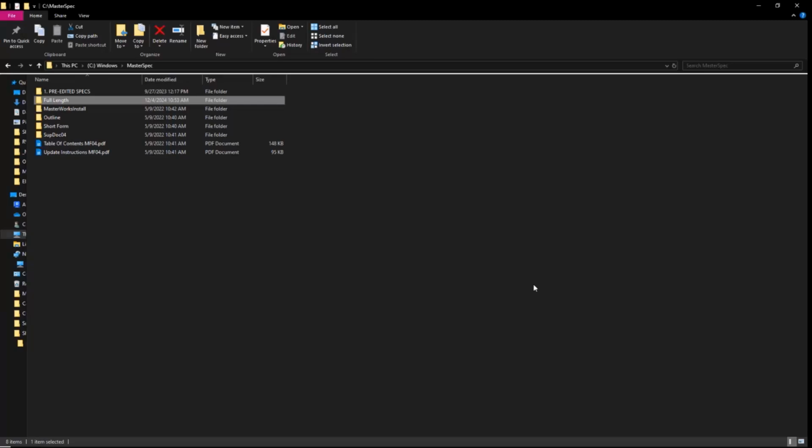If these were larger projects with larger budgets and longer construction times, I would have kicked them back and said, no, each one of these needs to be a submittal. But it's a $50,000 job, start to finish. I'm not worried about small potatoes like that. But when it's an $80 million wastewater treatment plant, for instance, no, you're going to submit these under each individual division. You're going to mark clearly what you are using, mark out what you are not using, because you can have one submittal for 600-volt conductors, and it's going to be 200 pages long.